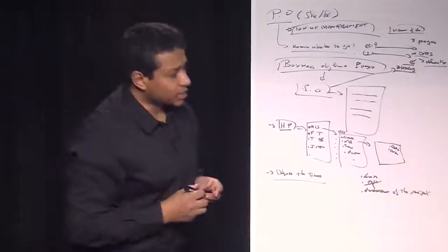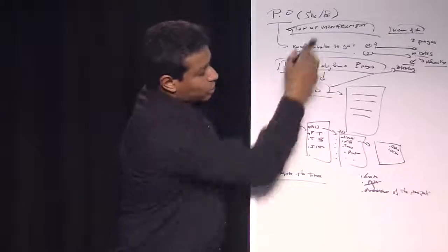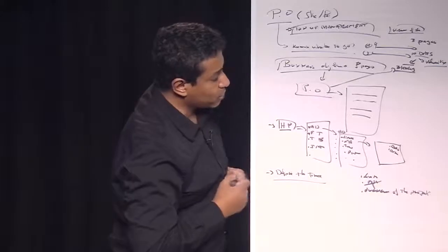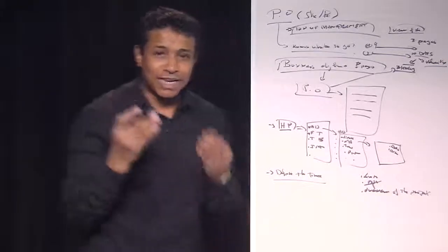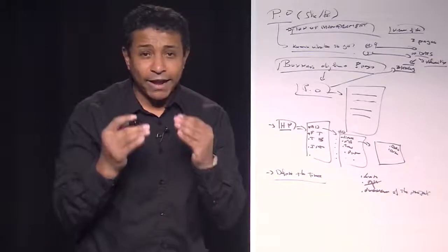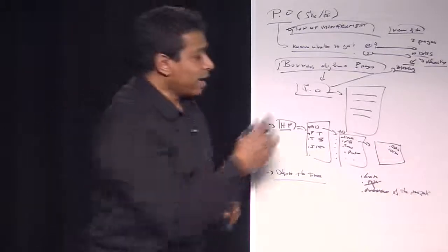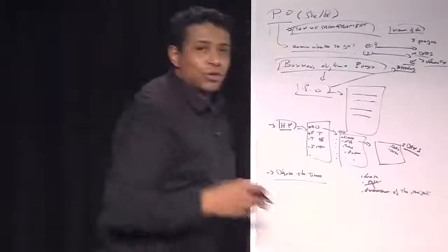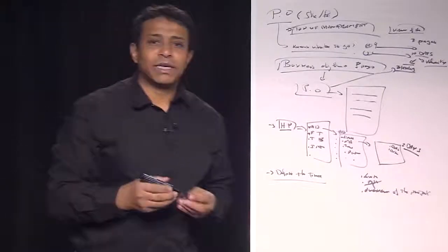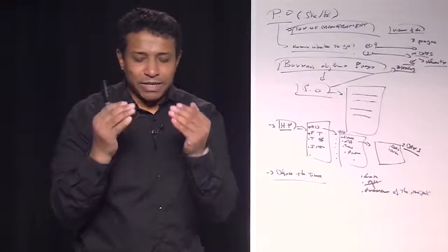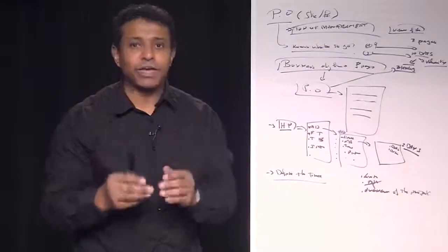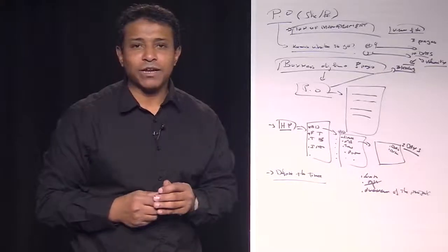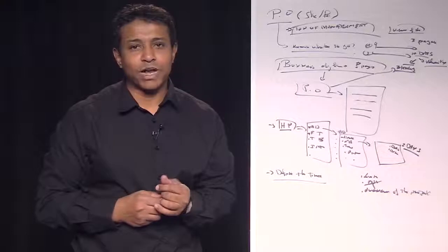Okay? So the product owner knows, and he's got an engagement from his team, that he's going to get a retrospective of the header and the footer, meaning that he can see on the screen the header and the footer by, let's say, 3 days or 2 days. So 2 days later, he's got to be able to know that he's going to see this header and footer. If it is not possible, he will know it 15 minutes after the stand-up meeting, and we're going to see what the stand-up meeting is right after.